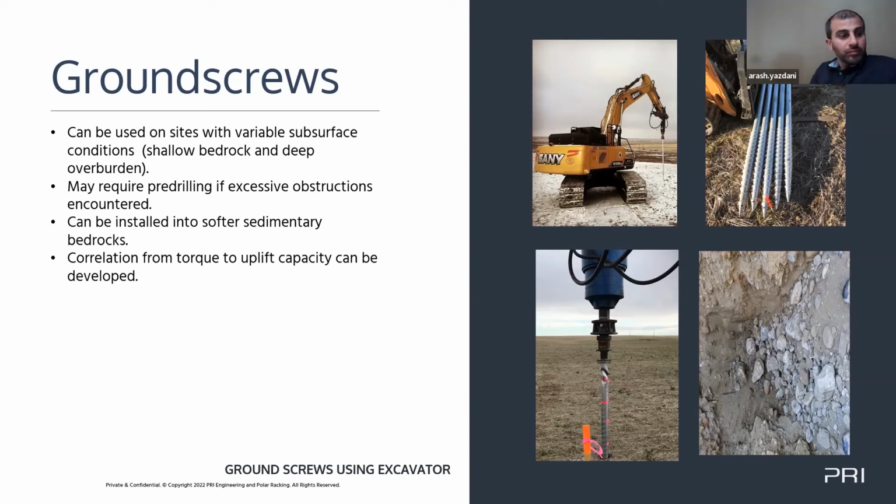Well, one thing I want to pick up on what you said, Dan, and I've learned this from Arash more than anything, is that failure is not great, but it's not a bad thing when you're testing. You want to know what fails. So you'd rather fail 5 ground screws during testing than roll in there with 50,000 screws and then start snapping piles, right? There's no such thing as bad data. Yeah. Exactly, and that's just it. I mean, the whole main objective is to fail during pre-production.